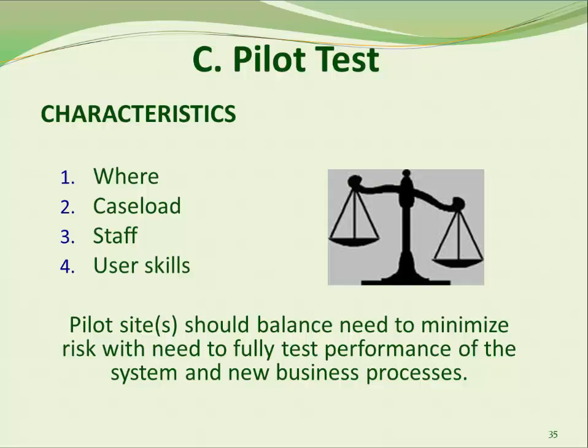These are some of the characteristics that help define your pilot. The pilot sites should contain as many variables as possible. You will want to look at geographic preferences, how many counties or local agencies. What is the caseload in those locations? Might you need to add an area for more accurate representation of your current operating environment? How adaptable are the staff in these areas and what kind of user skills do they have? Will they be an accurate representation of your staff demographics?